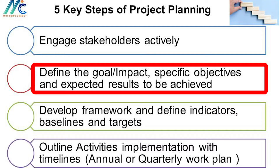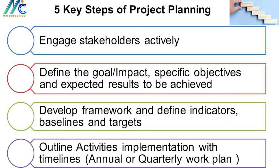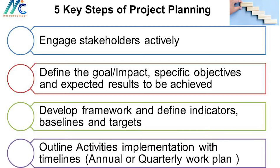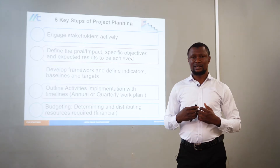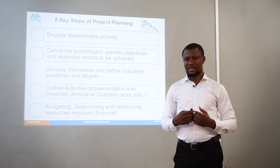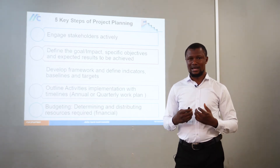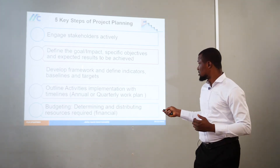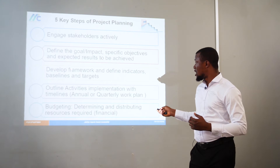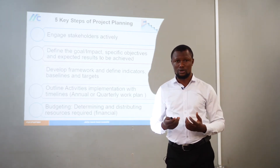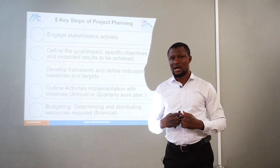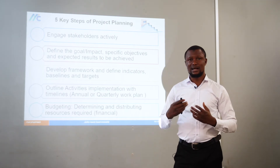Secondly, you need to define your program goal and impact with specific objectives and expected results to be achieved. Thirdly, you need to develop a framework — here we call it the M&E framework — and define your key performance indicators as well as your baseline, and then set realistic targets. We have a separate module on how to use logical framework and results framework to plan your project, how to develop SMART indicators, and how to define your baseline and set realistic targets.